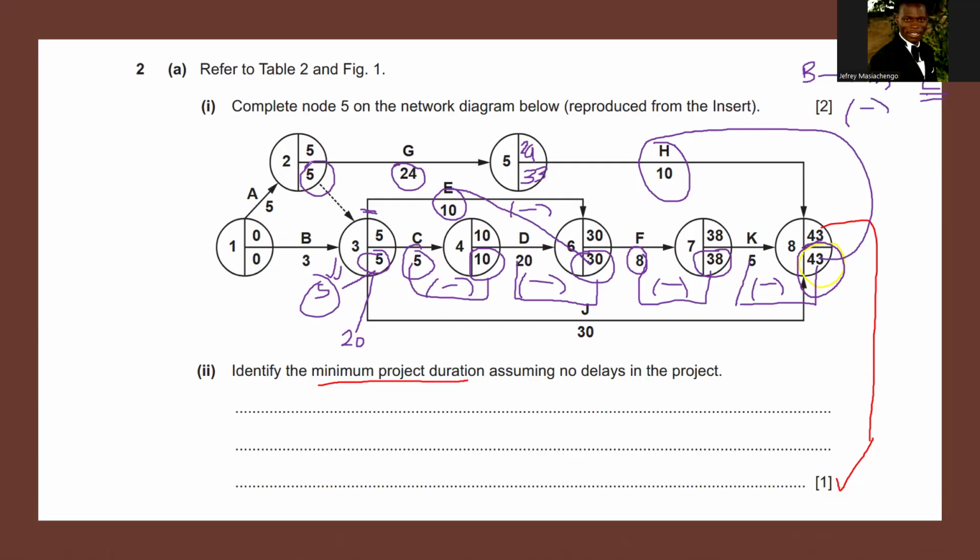It's an activity where two things are converging. Please, can you listen twice here? We are saying 33 minus 24, we get 6 plus 3, we get 9. So we are going to write 9. But you hold on, there is another activity. These activities are converging at A, from backwards. So we are going to say 5 minus 0, because the duration here is 0, right? So we say 5 minus 0, and we have got 0 and 9. These are the two scenarios now that we have.